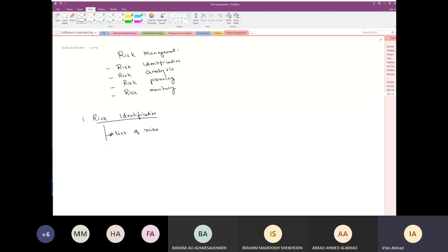So yeah, you need to identify risks. Some of the risks would be very apparent in a given project, right? So as a team, you know, okay, we know that this technology we are committing for the project, we don't have good experience. So the risk is that we might not be able to deliver this because we don't have this experience in the technology. So some of the risks could be obvious. But some of the risks, you have to use indicators to identify them.